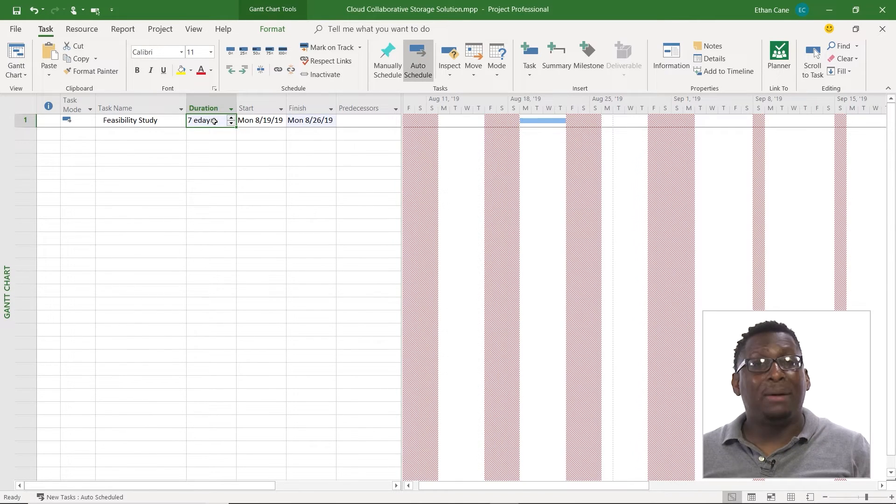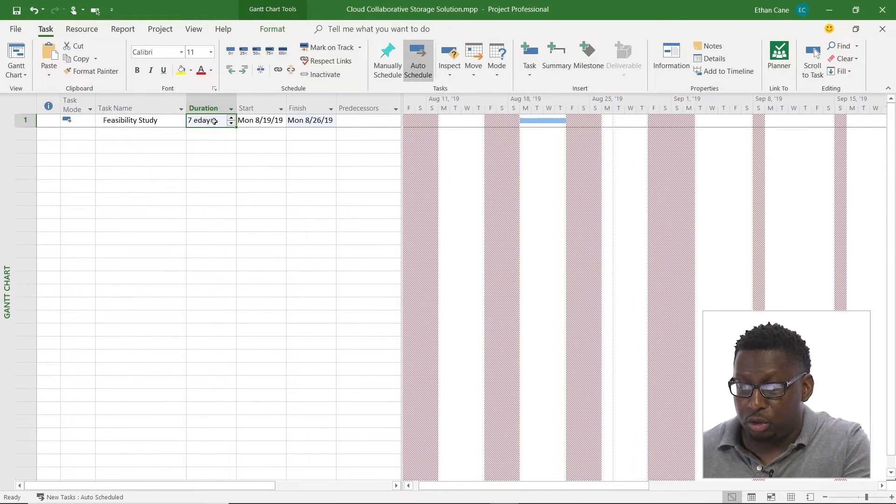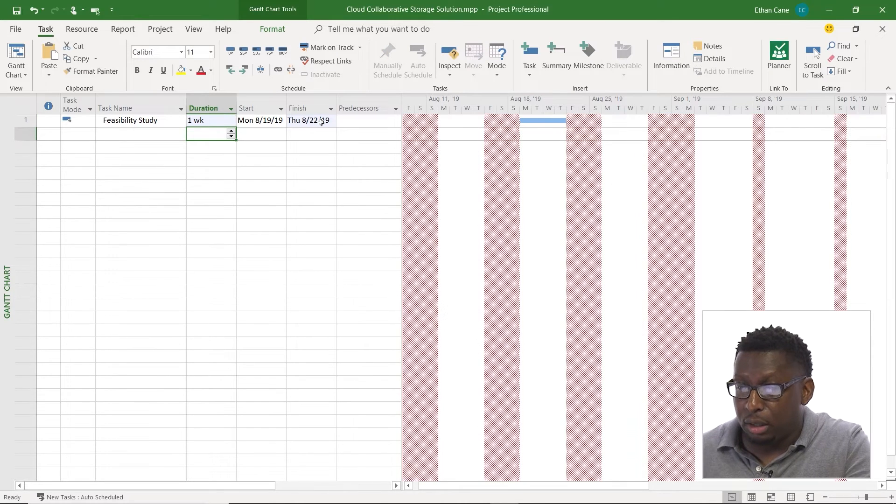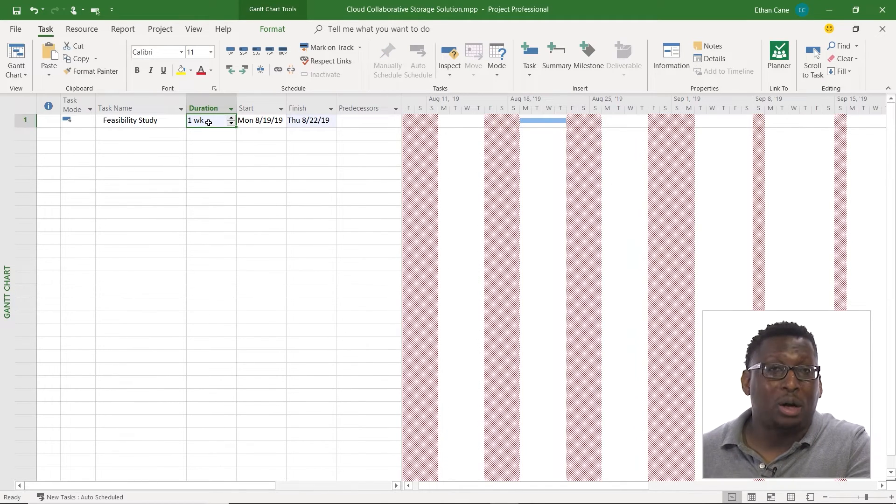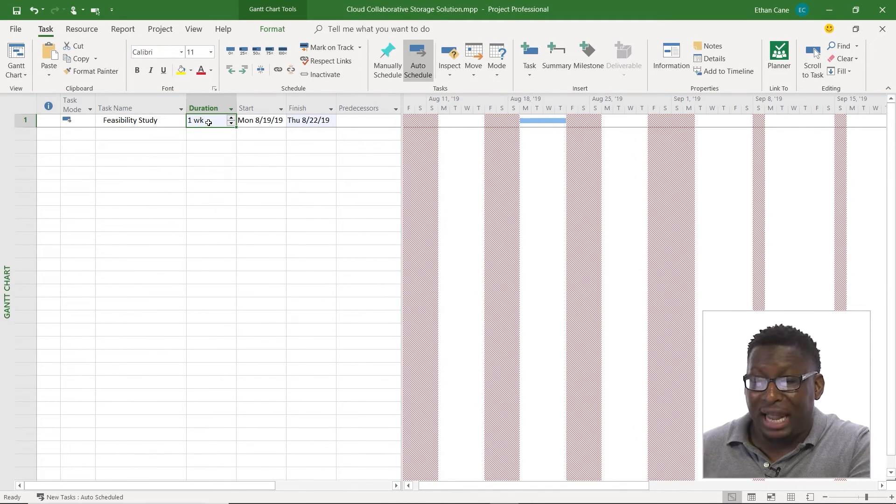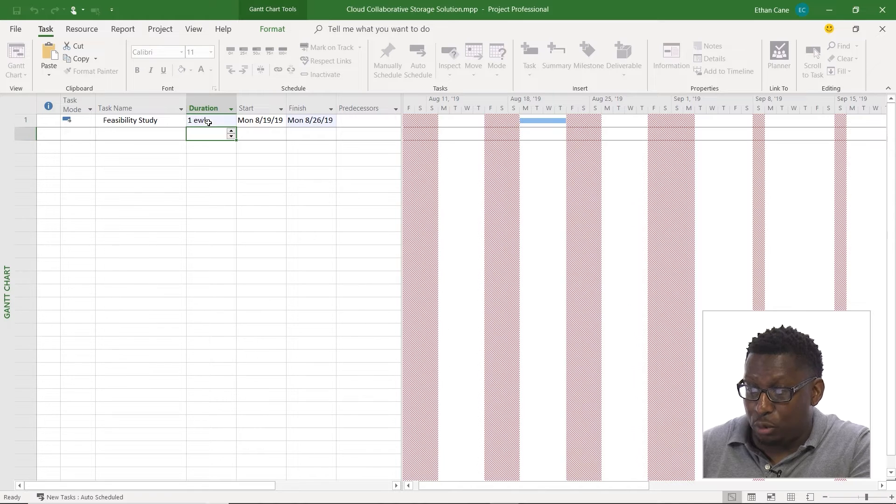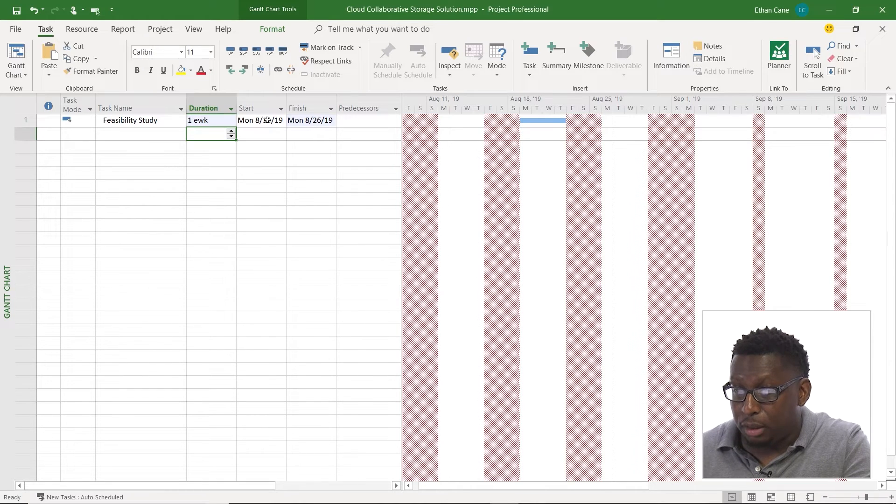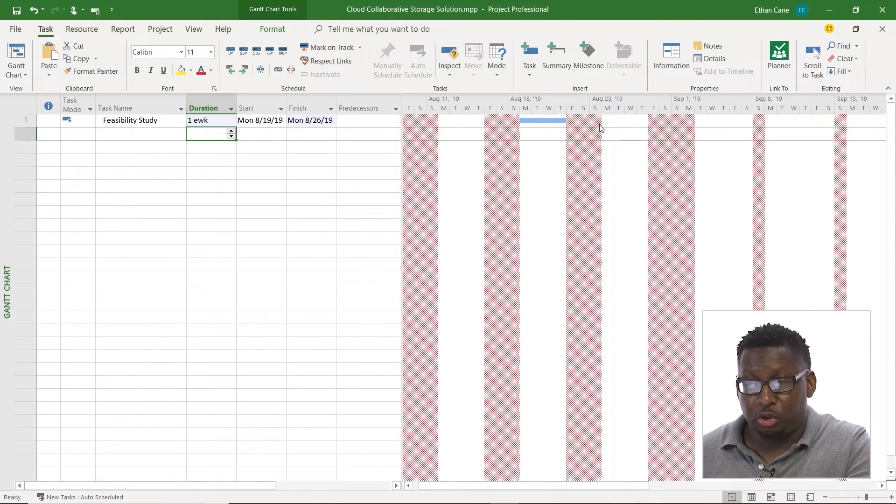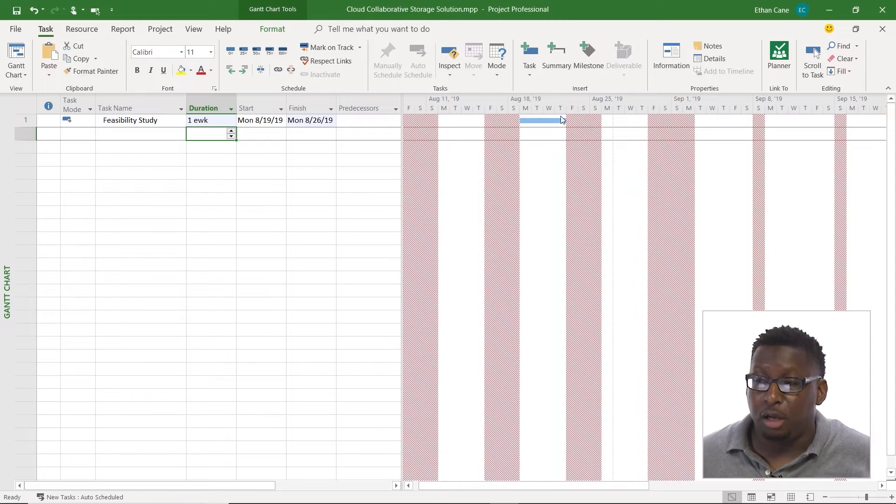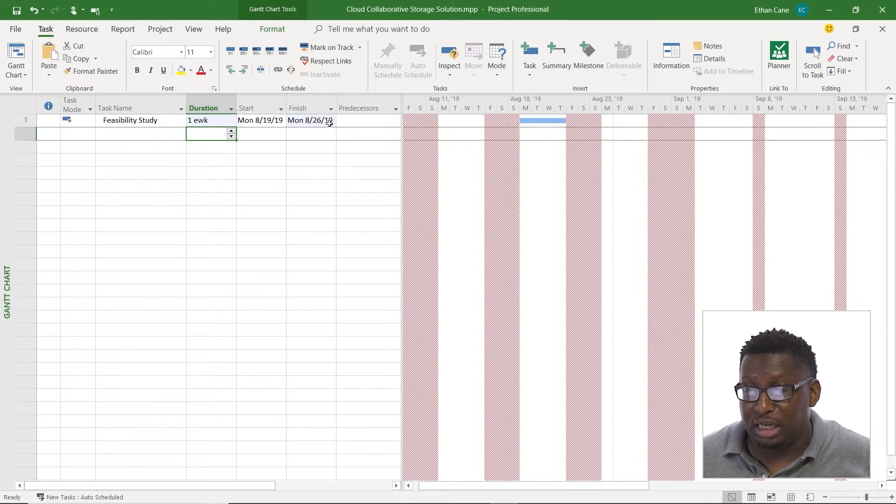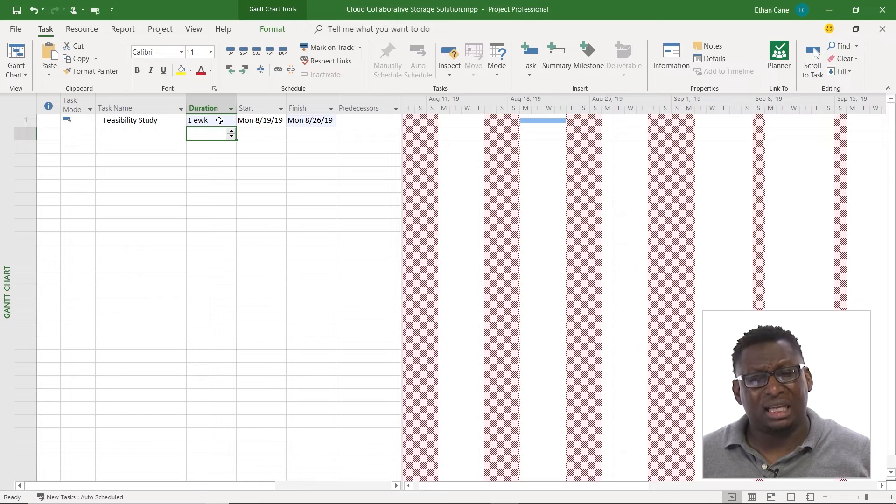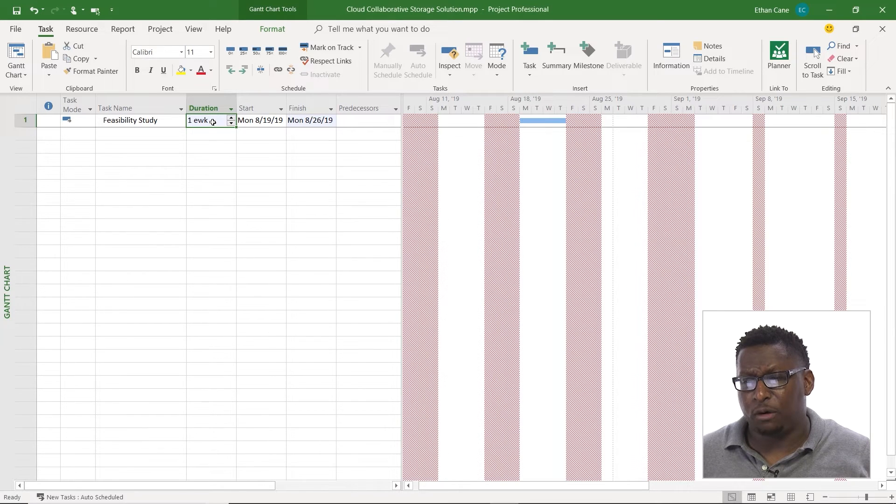How about a week, so I'm going to do instead of one week, let's say I'm doing an actual calendar week, I could say one E week. Notice that my finish date changes, you can't see it because it's being covered up here by the non-working time, but my finish date changes here to the 26th instead of the 22nd I believe it was before.